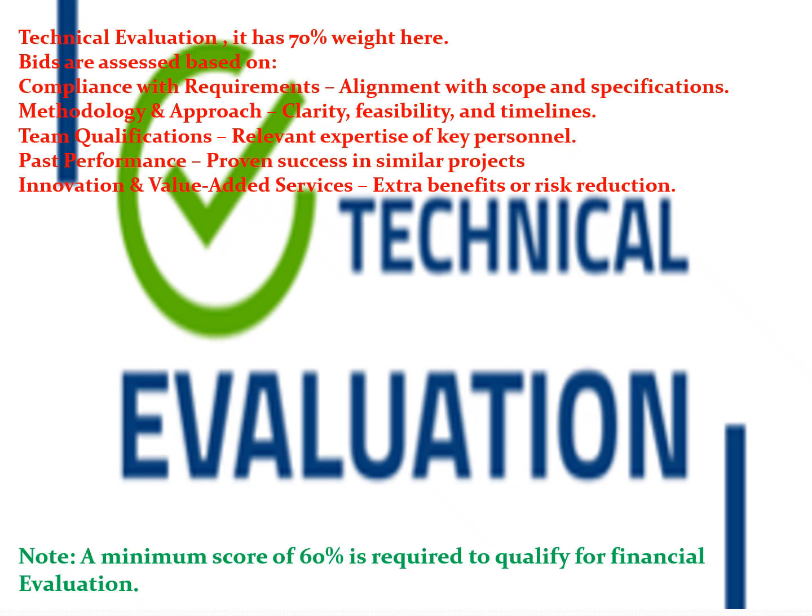timelines, team qualifications, relevant expertise of key personnel, past performance, proven success in similar projects. Innovation and value-added services, extra benefits or risk reduction. Note: a minimum score of 60% is required to qualify for financial evaluation.